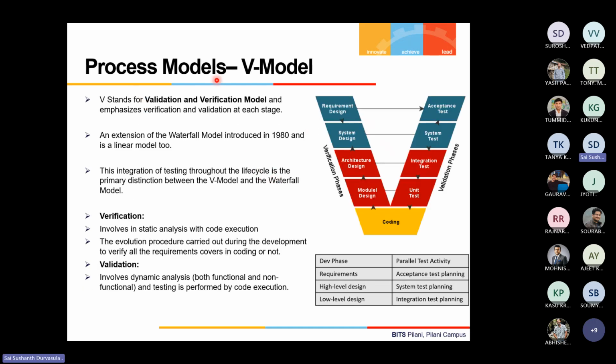So what the V model brings to the table is this: the same waterfall is there. The left side, if you were to see, you still have the same waterfall model. Additionally, they have come up with something called the test phase, or also called the validation phase. So V actually stands for two V's here, and this whole model is in the form of a V shape, right, with all these stages in place.